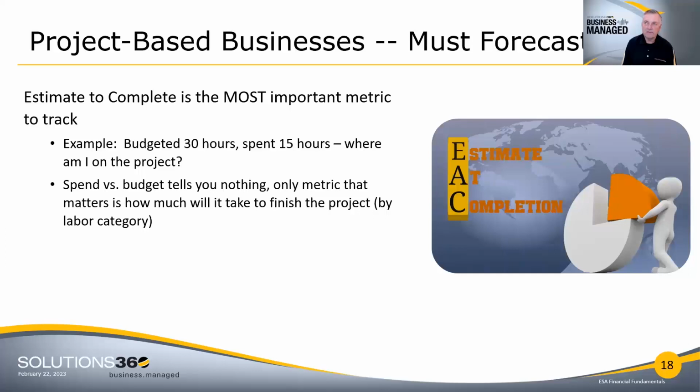So if you could take away one of many things I'm going to be talking about in your accounting programs, to have a great accounting system, you must be able to forecast the amount of time remaining to complete the task, not just how much you've spent on it. First, you have to have everyone assign all their time to projects. Second, you have to measure it on a weekly basis so you know your profitability along the way. But third, you have to have the discipline to know how much further.